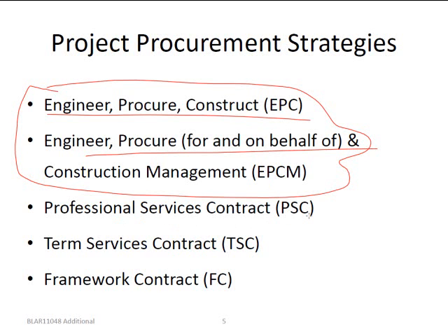Basically anything that we do not do physical work on site for. Alright, so this contract does not address physical site risk. It only addresses, you're basically selling hours. So engineers, quantity surveyors, building designers, anybody like that would use a professional services contract.